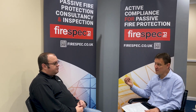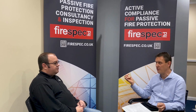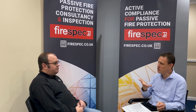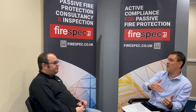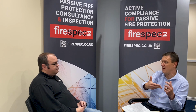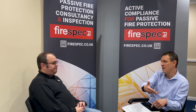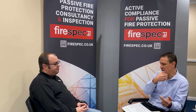In fact, commercial staff are very important. QSs are placing the orders. There's an awful lot of liability on them for placing orders, making sure that an awful lot of checks go into placing that order. Are these contractors suitably qualified? Are they third-party accredited installers? Are they able to demonstrate good quality control processes, that kind of thing?